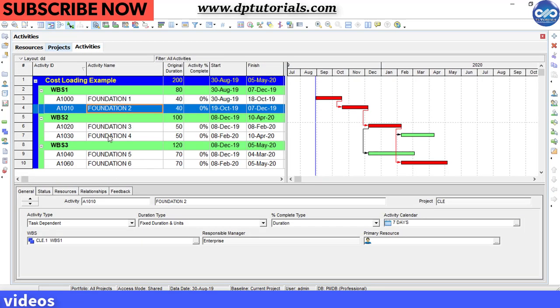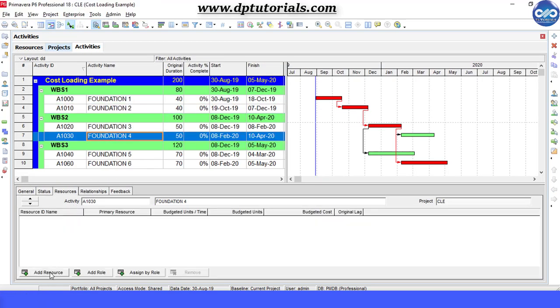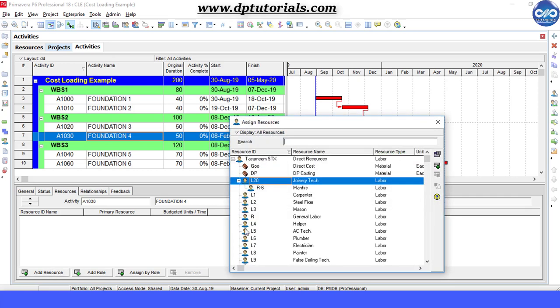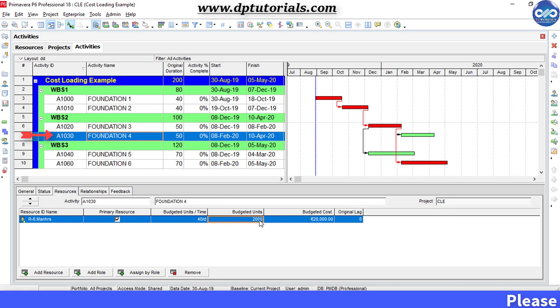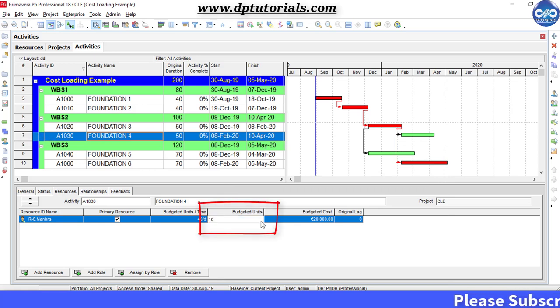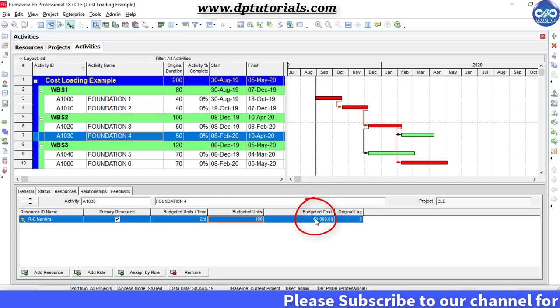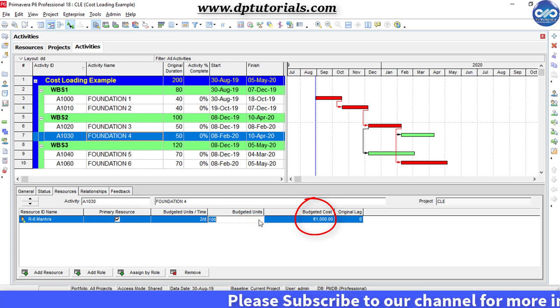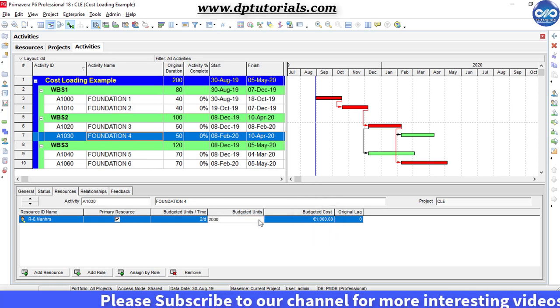Now, we need to assign this resource to each of the activity in our project. Let me assign this to this particular activity first. Insert budgeted manner for this activity and observe that the budgeted cost is being calculated by multiplying the unit price of the units.